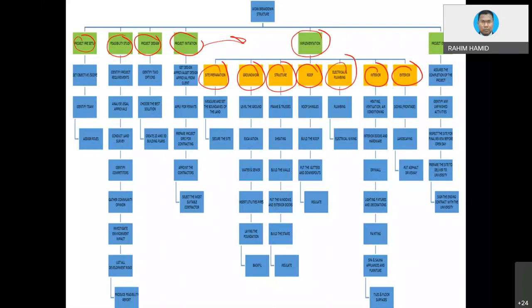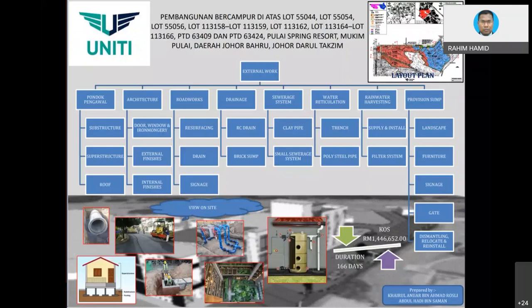Sometimes you want to show the overall picture but it might not fit on one poster or paper, so you can have another poster spelling out the detail for certain items. Here is an example of external work only: external work consists of guard post, architectural elements, roadwork, drainage, sewerage, water reticulation, rainwater harvesting, etc.